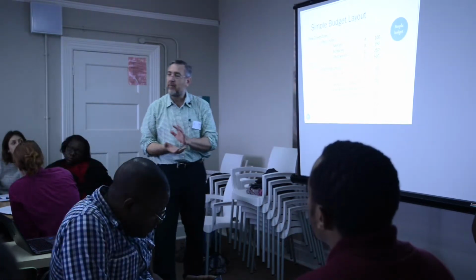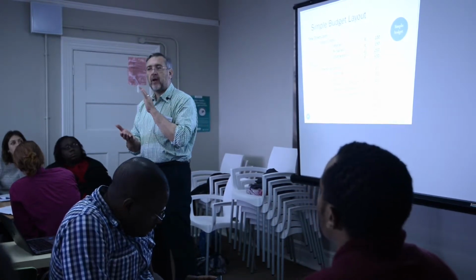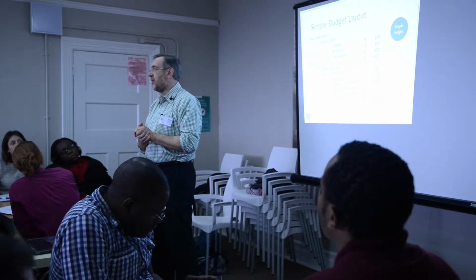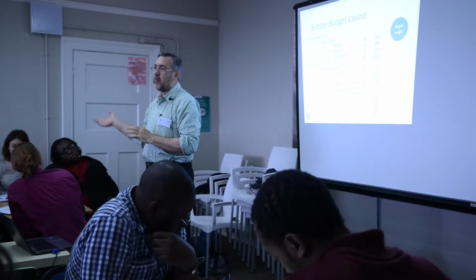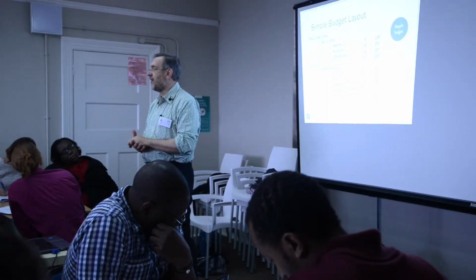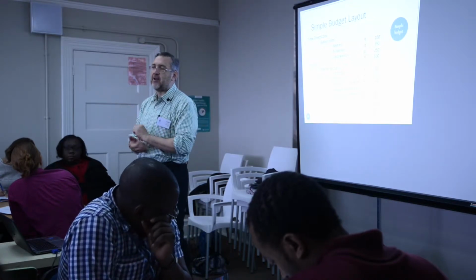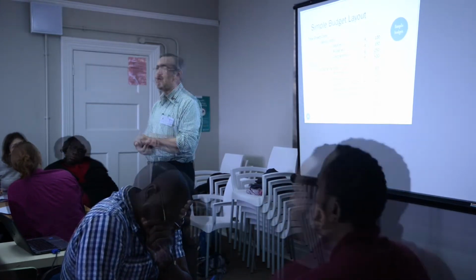Did everybody hear that point? Remember, every time you get a grant, there will be a written rule that you're going to have to report on progress. Typically, they're annual reports, including a final report that covers the whole, if it's a 3-year or 5-year or whatever grant. So reporting is a key element of this whole thing. And often we don't talk about it, and then people come up short.